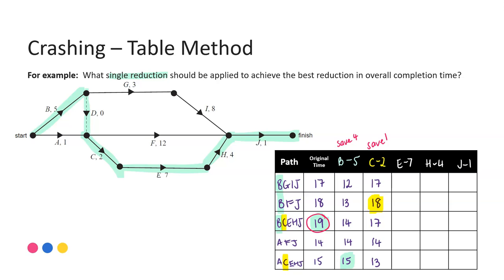Looking at activity E — E appears in the third and fifth paths. First path no change, second path no change. Third path: minus 7 from the original. Fourth path: no change. Fifth path: minus 7 from 15, brings me down to 8. The longest value there — 18 — is my new critical path, meaning I have again been able to save 1.